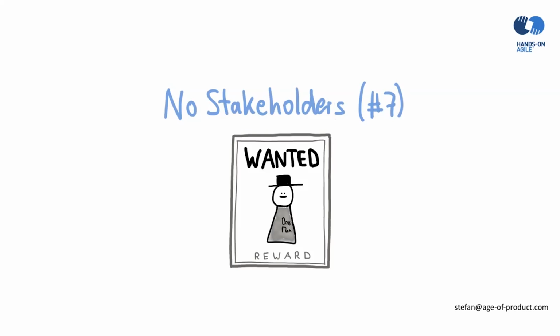And this is a crucial part that the Scrum Master, as well as the product owner and the rest of the team, should team up for and figure out an appropriate strategy to handle this. So what we did, for example, in one project at the beginning, we gave away small jobs, so to speak. So 1 point story, something around that, to the stakeholders who appeared at the sprint review meeting. Okay, it was a bit of bribing them. It was certainly not according to the Scrum Guide, but it worked out well.